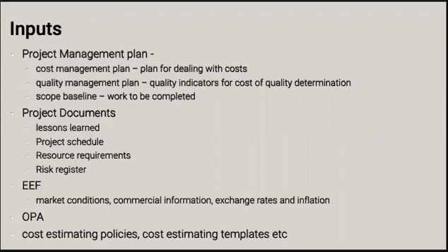As the project is progressing and we're learning more lessons, we're going to be relying on lessons learned more and more, because we are learning more about the nature of work, the characteristics that work has, and the costs associated with the work. We are going to use that information in adjusting our estimates as we are carrying out cost estimates at further stages of the project.